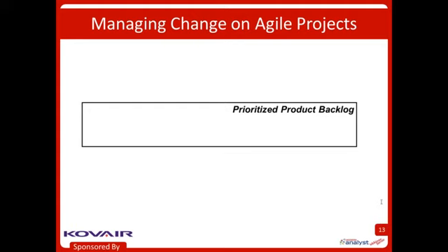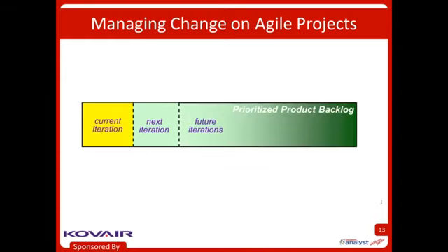In each iteration of the project, we will implement the appropriate set of work items from that backlog that have the highest priority, for whatever reason you choose to assess priority at that time. Now, things happen. So we're looking ahead to say, what are we working on now? What portion of the backlog today? What are we thinking about doing in maybe the next iteration, and what are we deferring to some later iterations that we'll worry about at the right time?